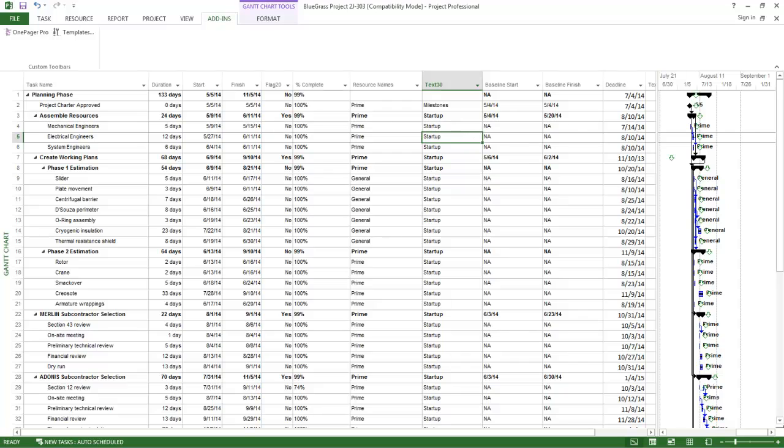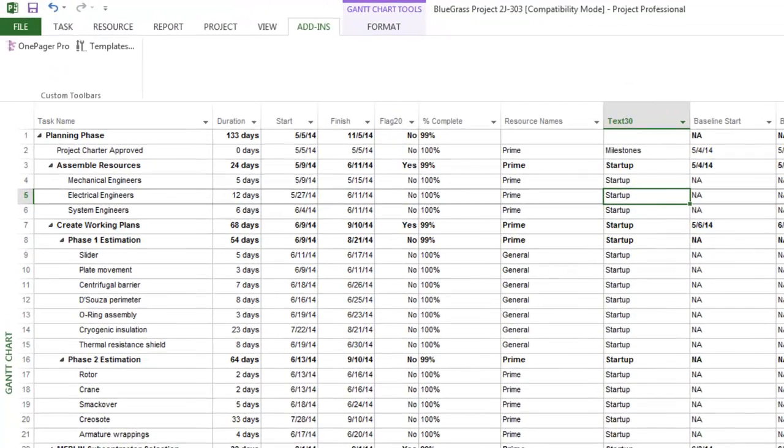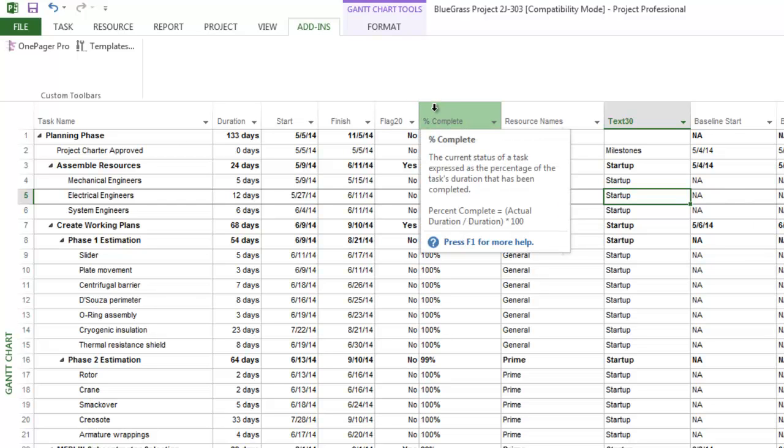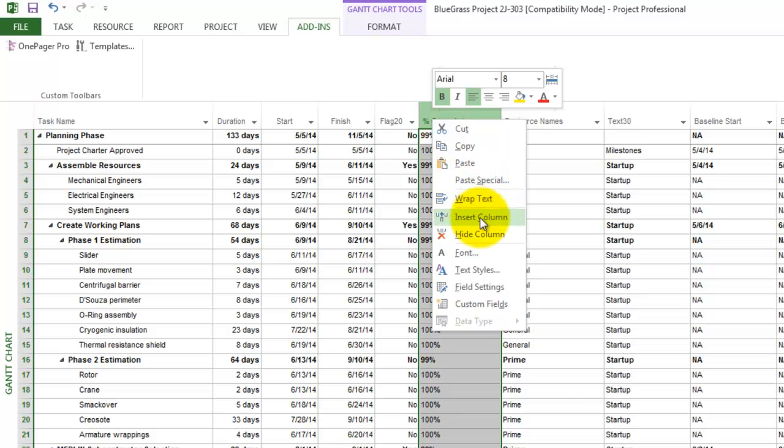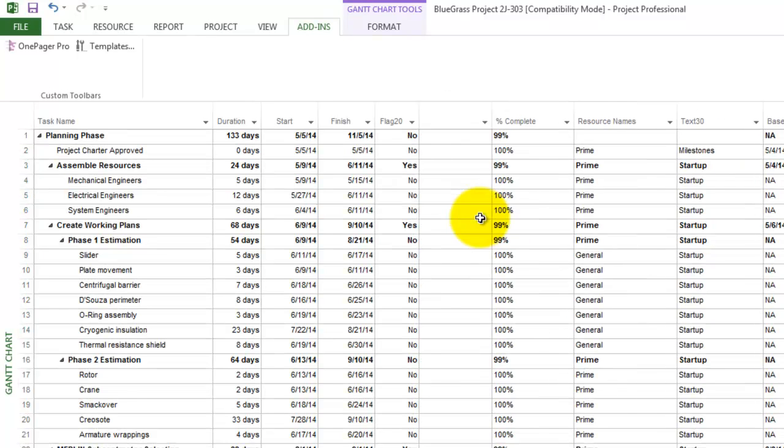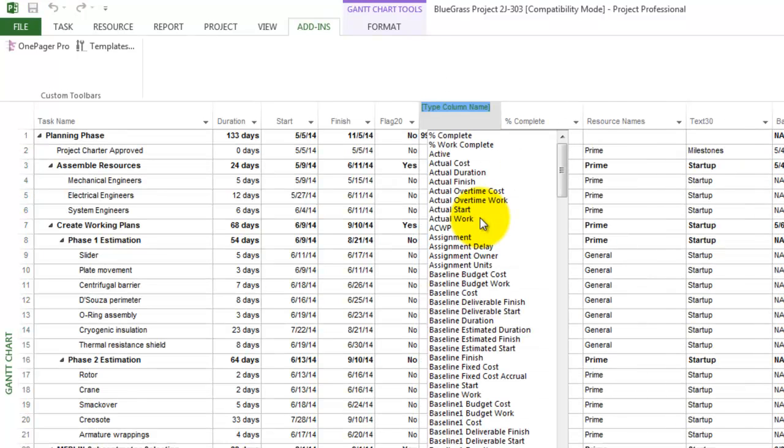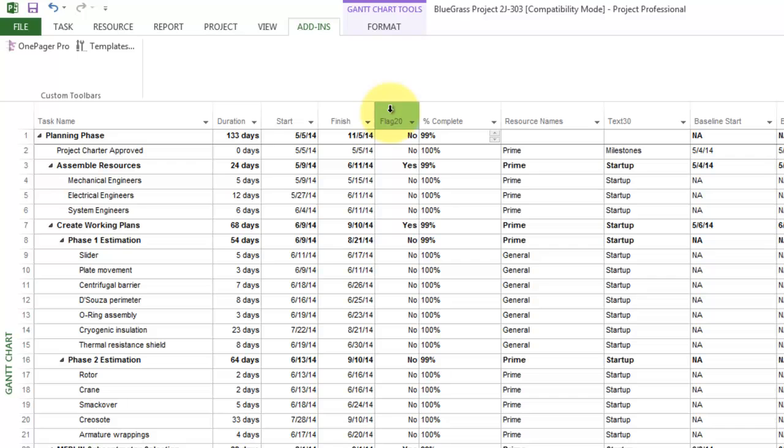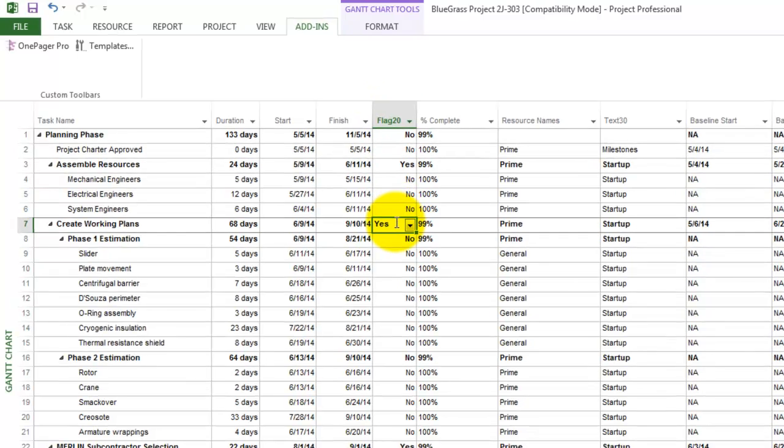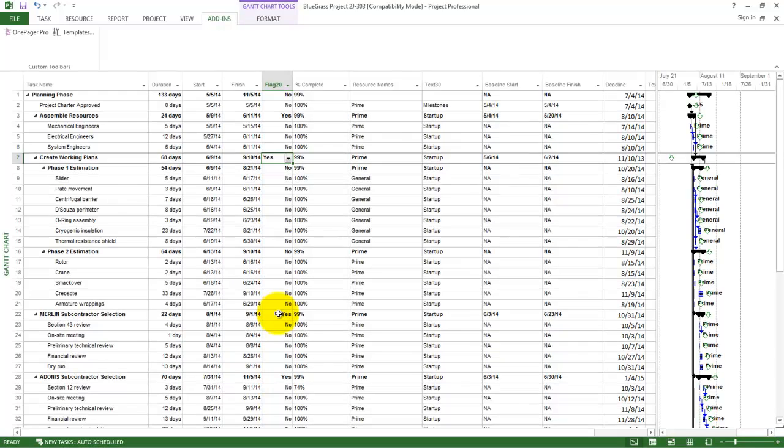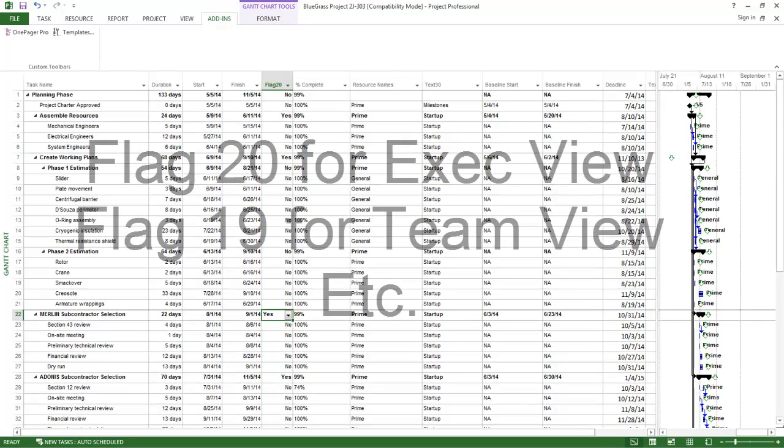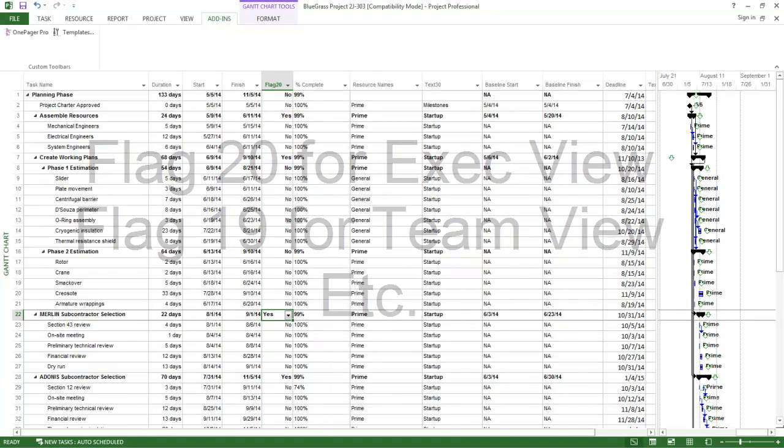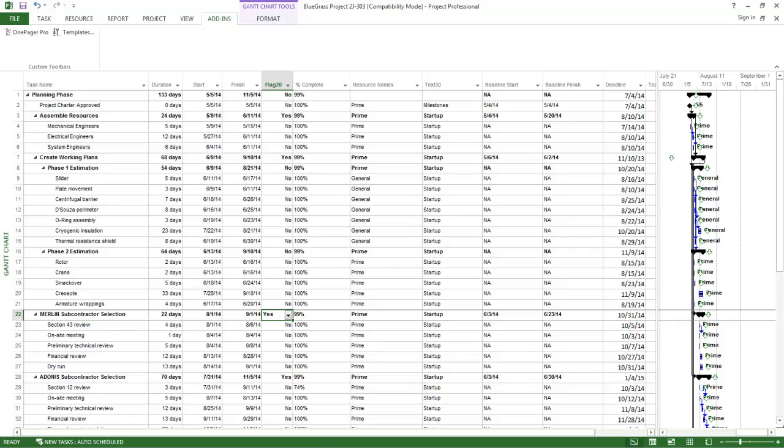If you want to be choosy about the tasks and milestones you're pulling into your visual, add a flag column to your document. You can add a flag column by right-clicking into any column header, selecting Insert Column, and then when you hit your F key, you'll see the flag columns you have available. Any flag column will do. Once your flag column is present, put a yes value next to the activities and milestones you want in your chart. Keep in mind that you are not limited to just one column of yes values. You can add as many columns to your project or Excel file with different combinations of yeses to create charts that will fulfill the needs of different conversations or presentations that may occur over the lifetime of your initiative.